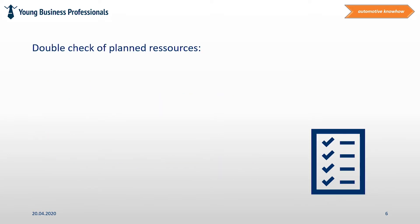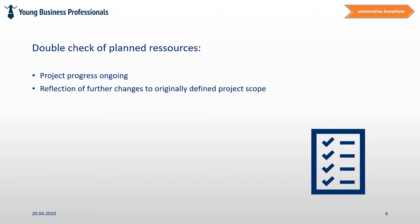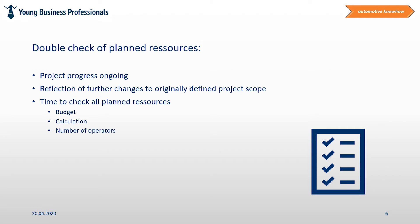Double check of planned resources. Before kicking off procurement of the planned equipment, it makes sense to double check the originally planned resources. The project has moved forward and eventually things may have developed in a different direction than originally planned. Often additional or changed requirements cause design changes that potentially impact the process and its cycle times as well. This may also result in changes to costs, layouts, and capacity. Due to that, it makes sense to check the following: the status of the budget, the status of the calculation, the number of operators required for the assembly process, required space in the production plant, and also the achievability of production capacities which were promised in the quotation to the customer originally.